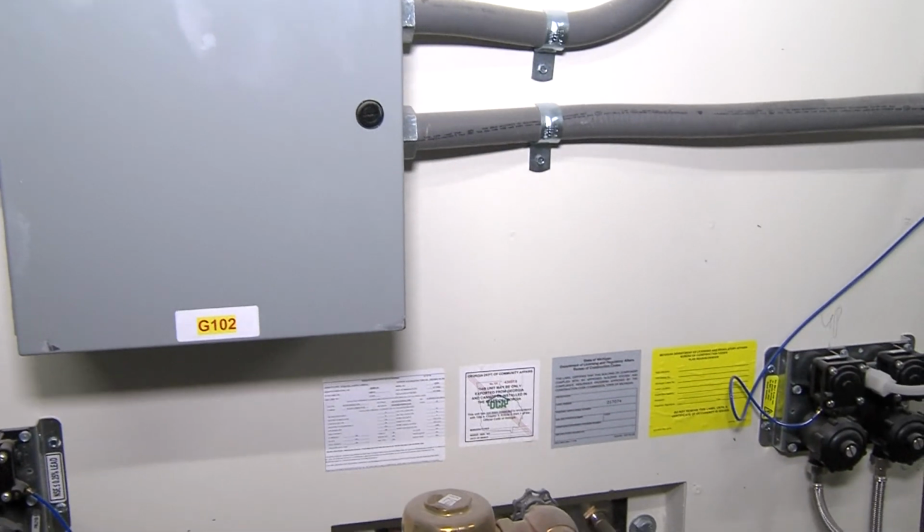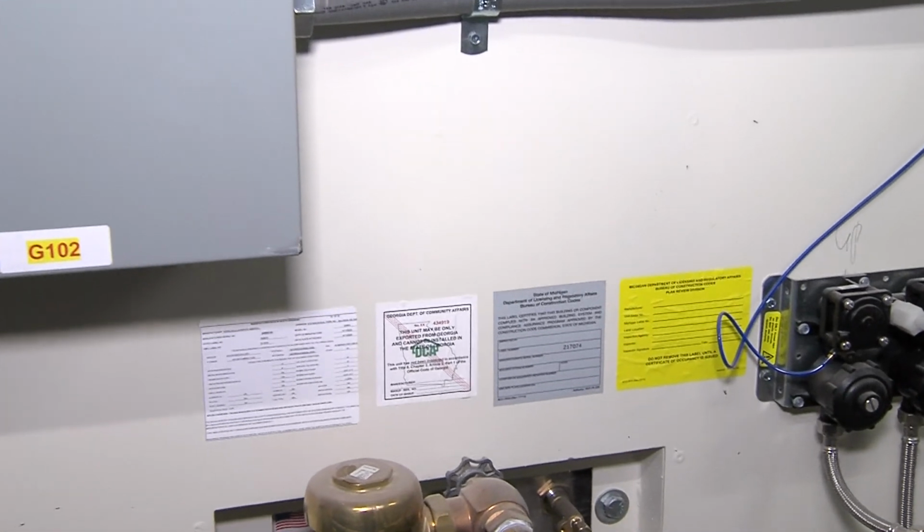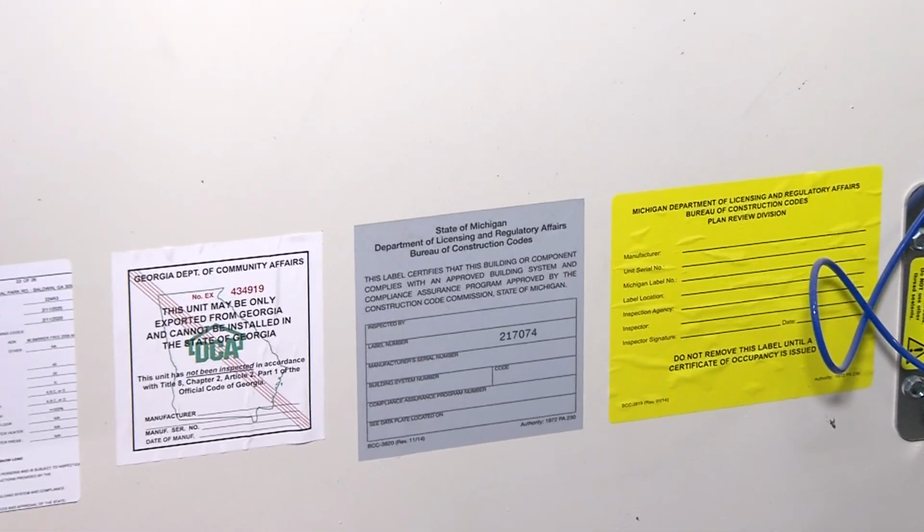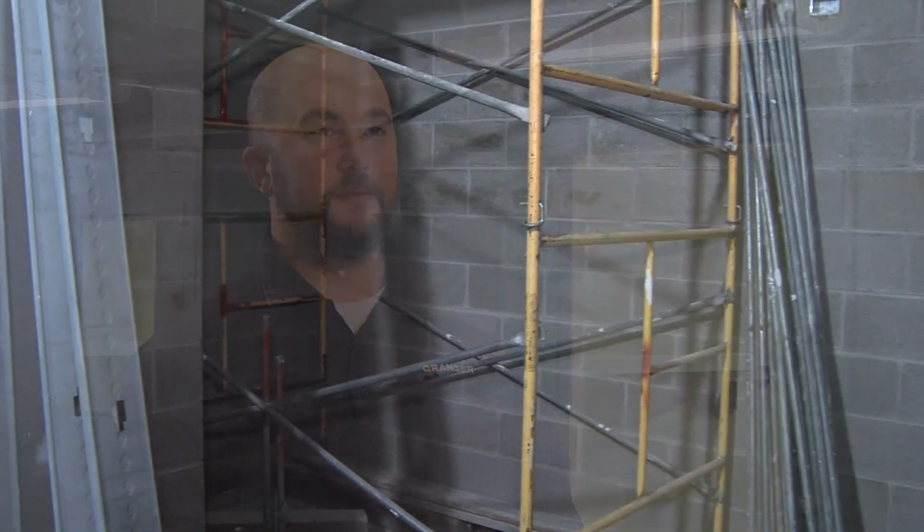Each cell has a PLC box factory installed on the back side of the cell with a flexible whip that allows cells to simply be linked together in the field. This provided a huge savings of approximately $2,500 per cell over having these field installed, where each cell would require an individual home run for each device. Again, time and general condition savings were recognized on top of this.